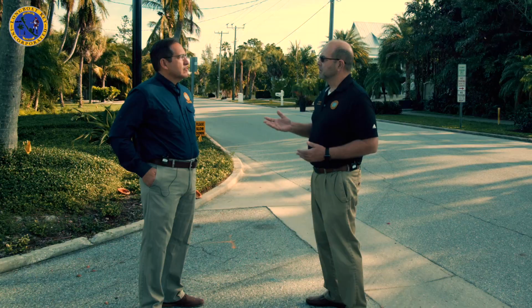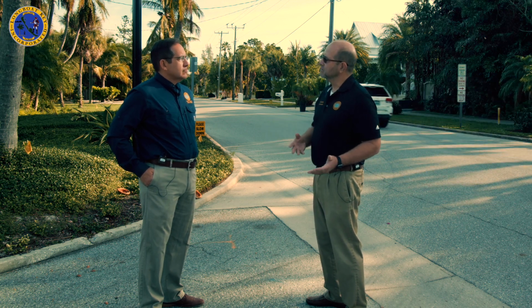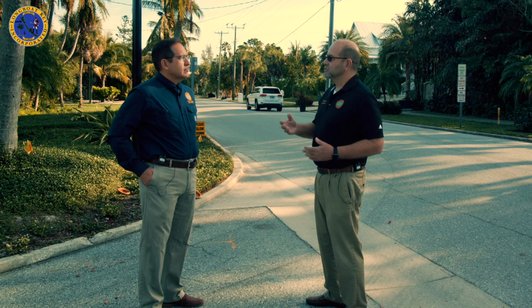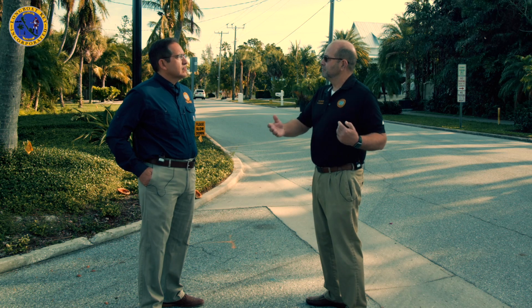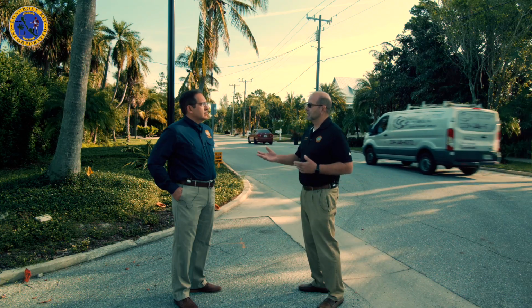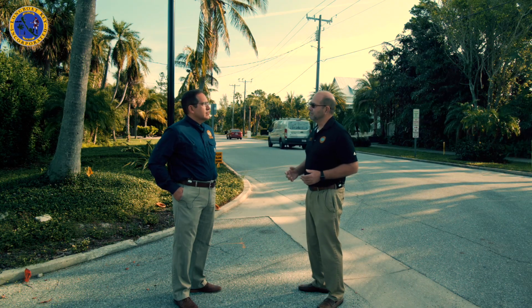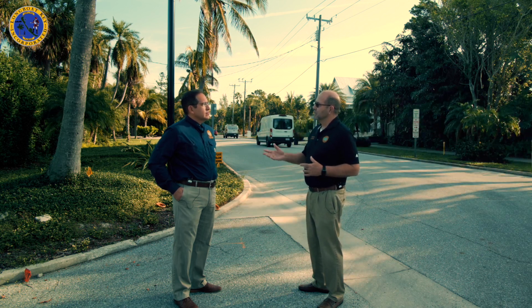We do report quarterly to the town commission in a public meeting on the status of the project. One of the things we talk about is budget, and there are a couple of things related to budget. One, we have contingency built in as we look at both the GMD portion of the project and the neighborhoods. We've stayed away from generally using that contingency, which is, I think, a couple million dollars overall when you add them together. And then even beyond that, we are several million dollars under.